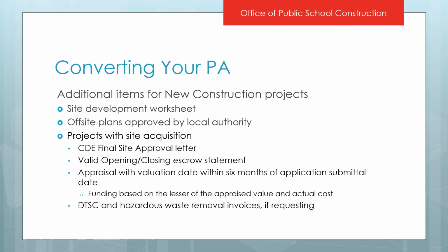Now, if you have a new construction project, a few other additional items that you will need to submit is a site development worksheet, off-site plans that have been approved by the local authority. And then if your project consists of site acquisition, you'll also need your final CDE site approval letter, a valid opening or closing escrow statement, an appraisal with a valuation date that is within 6 months of when we receive your application, because your site acquisition funding is based on the lesser of that appraised value or what you pay for the site. And then any DTSC and hazardous waste removal invoices if you are requesting those costs.